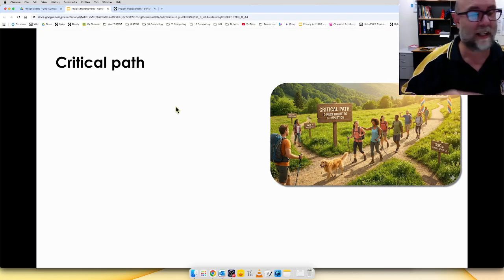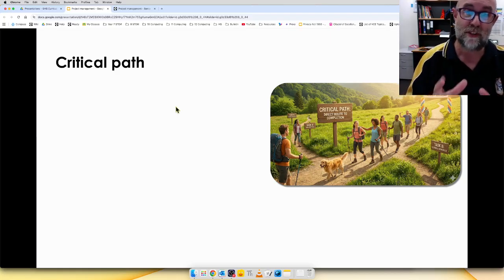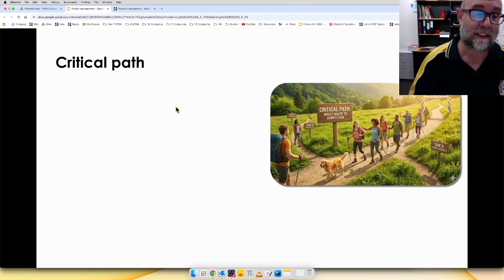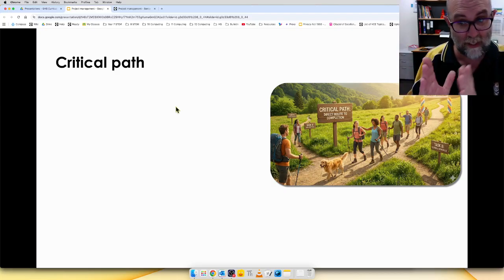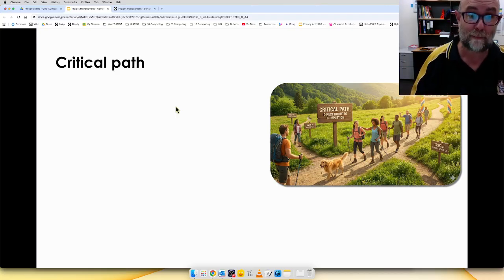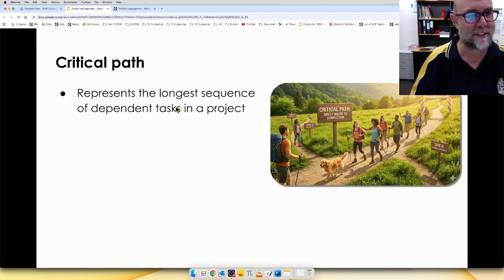Think of it as a little bit like if the bus can't leave until everybody gets on it. So that person is on the critical path. But if the bus can leave without them, well, then they're not on the critical path. The work still needs to be done. It's not about what does and doesn't need to be done. But if something's on the critical path and it's slipping, then you're going to have to get that time from somewhere. You might have to push the date back. You might have to squeeze something else. You might have to pour more money and people into it to get the critical path back on the right thing. But it's actually quite important in lots of organisations to get something done on time. If you read the papers, you'd think that was never true.